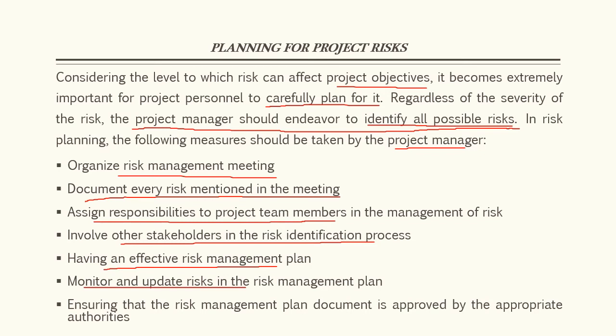At the end of the day, once you've had this meeting, once you've documented all of these things, you've done all your analysis and everything, you should be able to come up with this document we call the RMP, the Risk Management Plan. And these documents should be forwarded for proper approval before you can start implementing some of the things that are in the document.